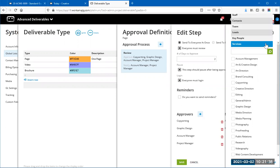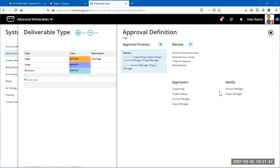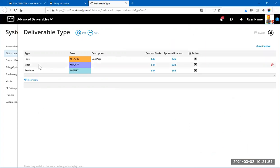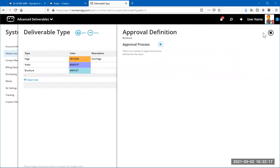You can also add approvers based on the project team — for example, if someone has 'Copywriting' or 'Graphic Design' checked in the project team, they'll be added as an approver. This allows you to dynamically add people based on their role. If nobody on the project matches, it's ignored. As long as your functions are defined properly, everyone gets added. These are neat ways to add people without having to manually specify them each time.